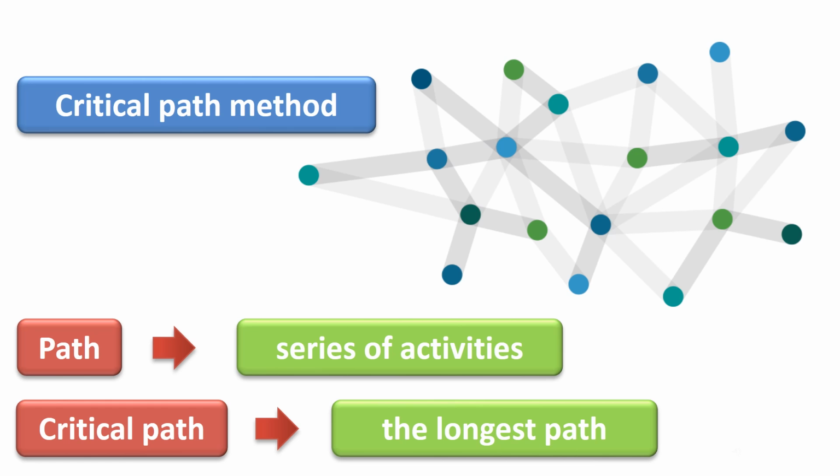Critical path method shows the time necessary to complete an activity, activity dependencies, milestones, deliverables and how each activity is connected to a former and subsequent activity. This critical path method depicts the connection between activities and the length of each activity. A series of activities is called a path, and the longest path in the diagram is a critical path. The critical path is the path that justifies the final project timeline.